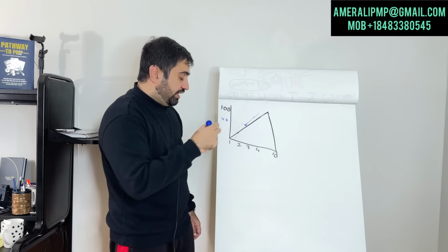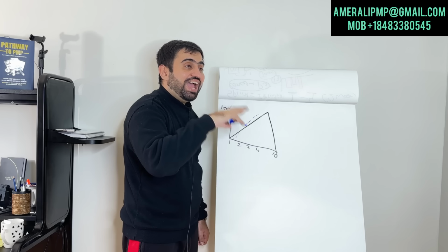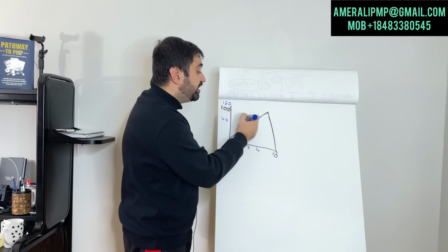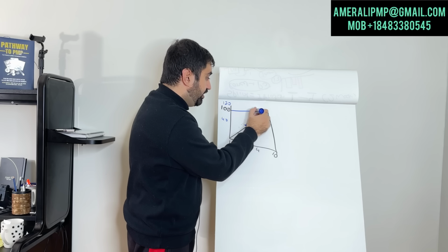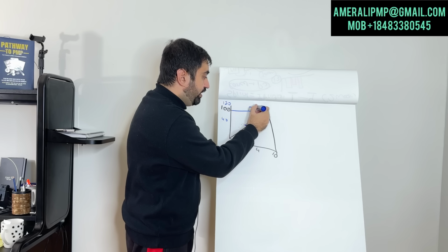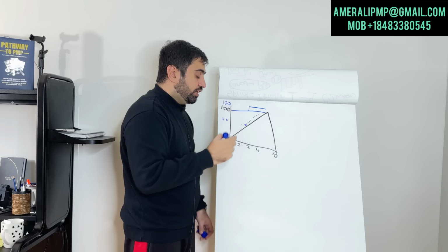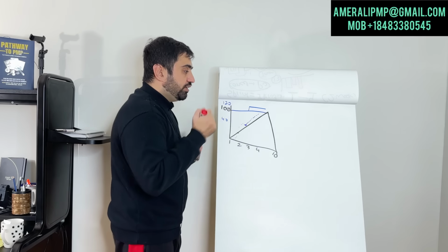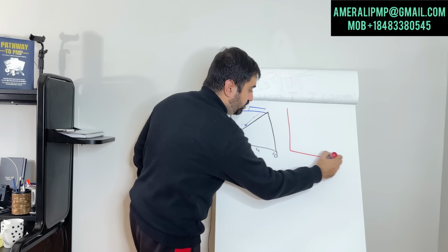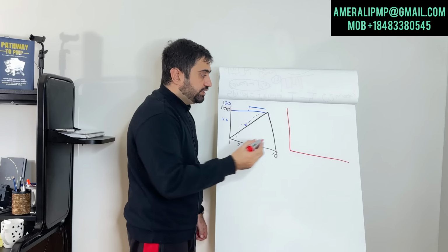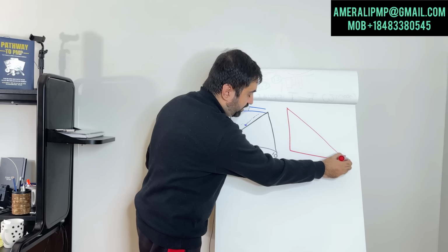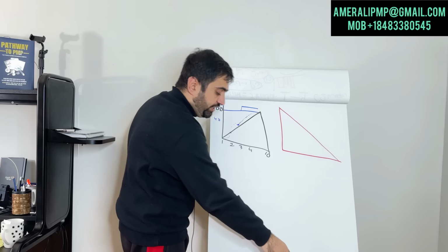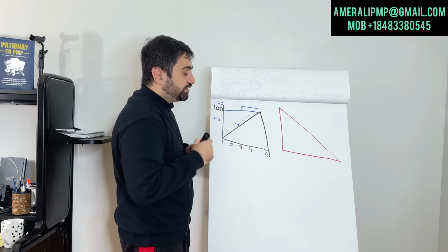Another important thing in the burn up chart: if you add scope, let's say if the story points go from 100 to 120, it can actually show you. First it was 100 and suddenly it became 120, it can show you. The other chart which we are going to discuss now, the burn down chart, is unable to show that. The burn down chart basically shows you how much work is done and how much work is remaining. Okay, it is also a data representation and data analysis technique, but it shows you how much work is remaining at any particular time.